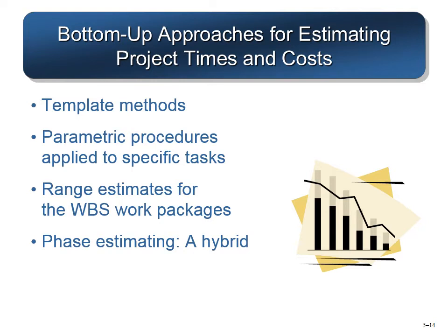And phase estimating or a hybrid technique. Initially when the project starts, we can start with a top-down approach, but as the project progresses, as we get into more details of the project, we can go into the bottom-up approach.